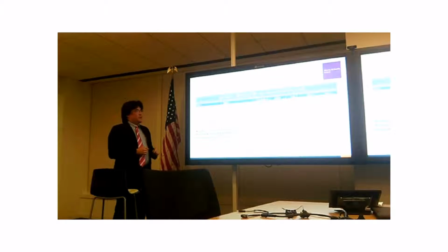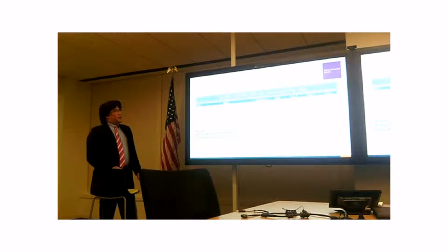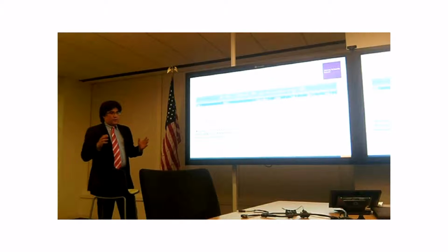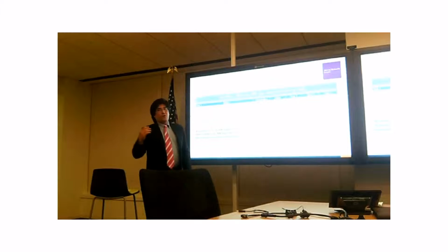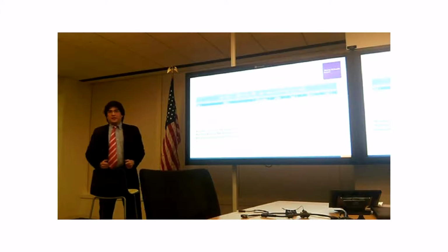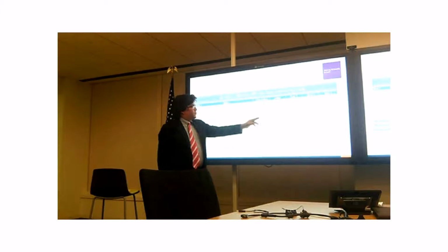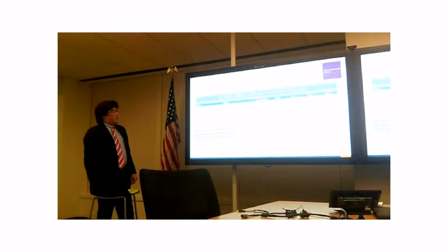The risk adjustment is basically, okay, I'm pretty confident that these are all of the costs that I'm going to save on, but what Forrester does here is they say, over an analysis of these different companies, you're probably going to see some of them not reach the level of cost reduction that's expected, and that risk is a 10% risk. So now you're adjusting what you think is the best case scenario with the actual 10% here, and you're reducing the benefit based on that.